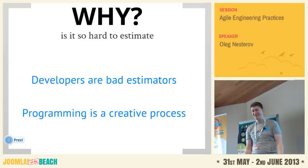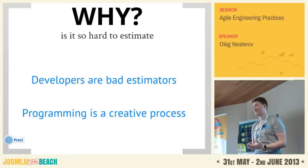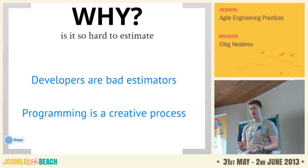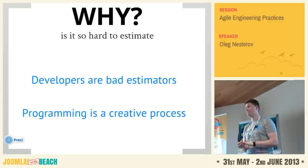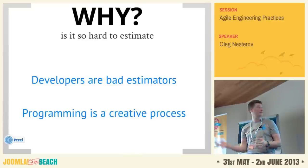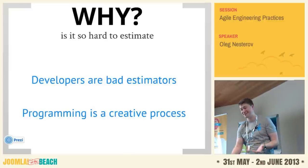Many of us have failed with estimations because we are bad estimators — we put our hearts into what we're doing and want to do it better. When you estimate a feature you might not think about making a button fancier, but then you go into the process and exceed your estimation. We are big optimists as developers. At my company we base all estimations on six hours per day of work, not eight.